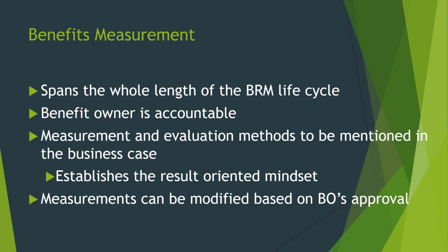So what is benefit measurement? What are its attributes? Benefit measurement spans the whole length of the BRM life cycle, from conception to realization. The benefit owner is accountable for benefit measurement. He might delegate to a portfolio manager as the responsible one, but finally the benefit owner is accountable.